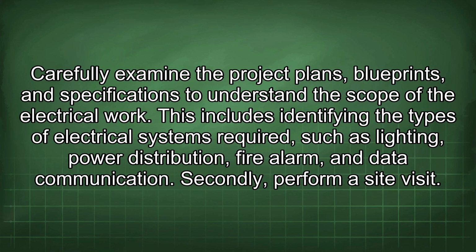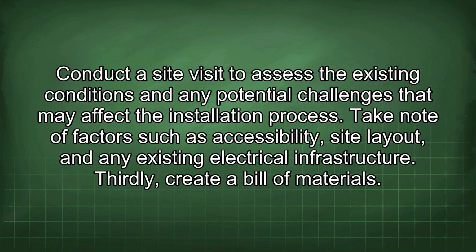Secondly, perform a site visit. Conduct a site visit to assess the existing conditions and any potential challenges that may affect the installation process. Take note of factors such as accessibility, site layout, and any existing electrical infrastructure.